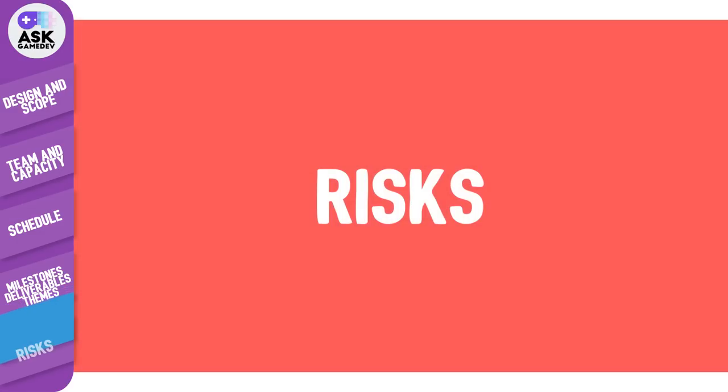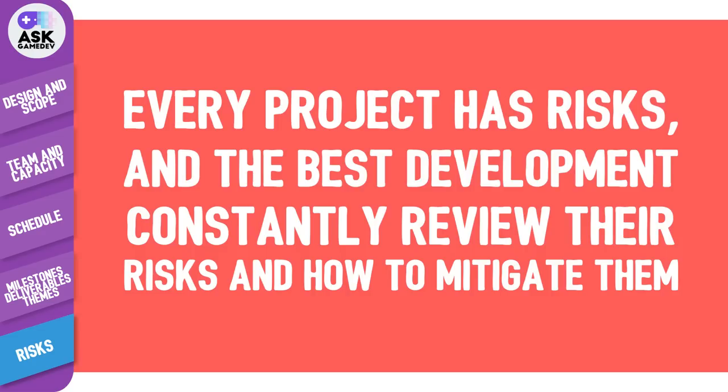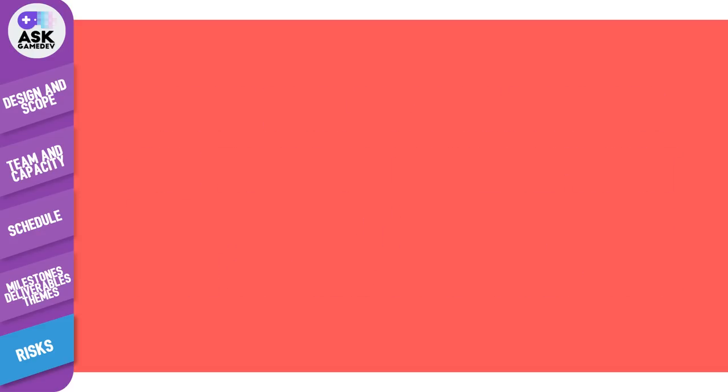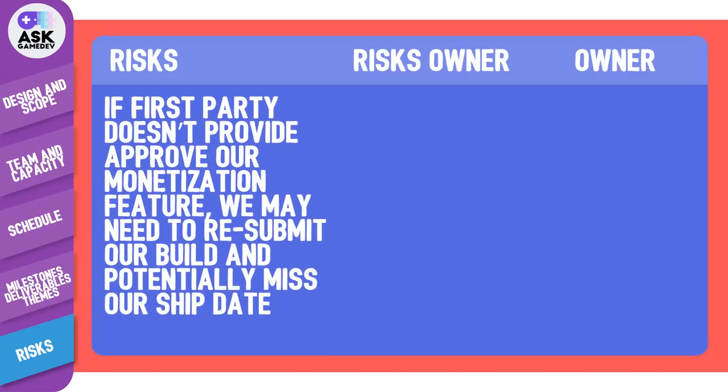And lastly, let's talk about risks. A final piece of your development plan is to define the project risks — things that could affect the cost, duration, or quality of development output. Every project has risks, and the best developers constantly review and figure out how to mitigate them. A good test is to ask yourself if the team has complete control over that issue. If the answer is yes, then it probably isn't a risk — it might just be difficult and something financiers will expect the team to navigate.